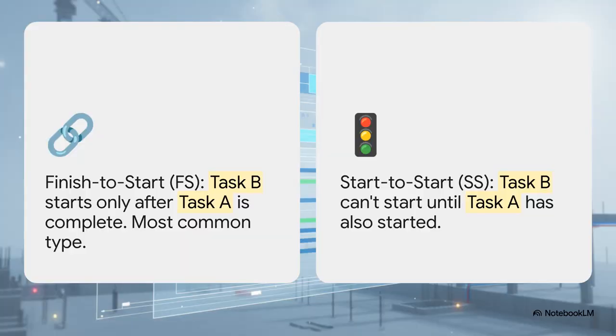And this part right here, this is where we build the actual logic of the project. The most common type of link by far is finish to start. You can't pour a foundation until you've finished the excavation. Makes sense, right? But there are others too, like start to start. You can even get clever and add lag time for things like waiting for paint to dry, or lead time to get a head start on the next task.